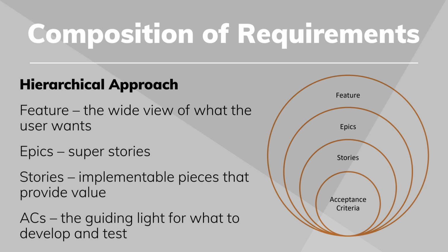And this is where you've got to be breaking these things down, but still thinking it's something that I can demo at the end of the sprint, and the user is going to go, oh, okay, I see that. So you got to be careful, because sometimes you can get so granular that it doesn't actually mean anything to the user. And if so, and maybe that's the right way to go, just make sure the user is primed for it. The last thing you want is for a user to leave the end of sprint demonstration and have them go, oh, there's nothing there.